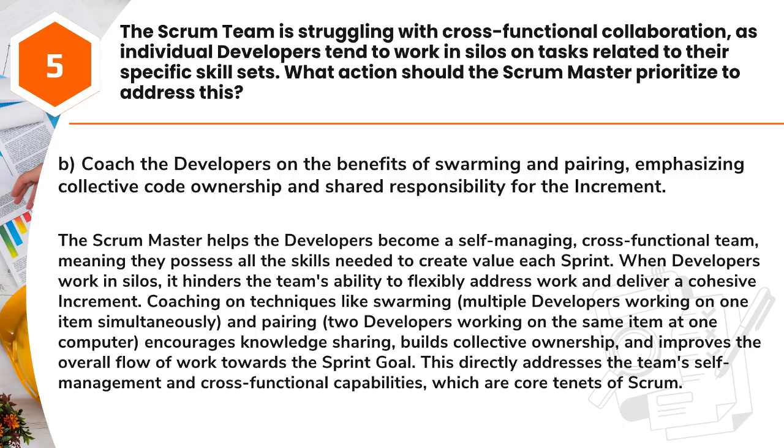When developers work in silos, it hinders the team's ability to flexibly address work and deliver a cohesive increment. Coaching on techniques like swarming, multiple developers working on one item simultaneously, and pairing, 2 developers working on the same item at one computer, encourages knowledge sharing, builds collective ownership, and improves the overall flow of work towards the sprint goal. This directly addresses the team's self-management and cross-functional capabilities, which are core tenets of Scrum.